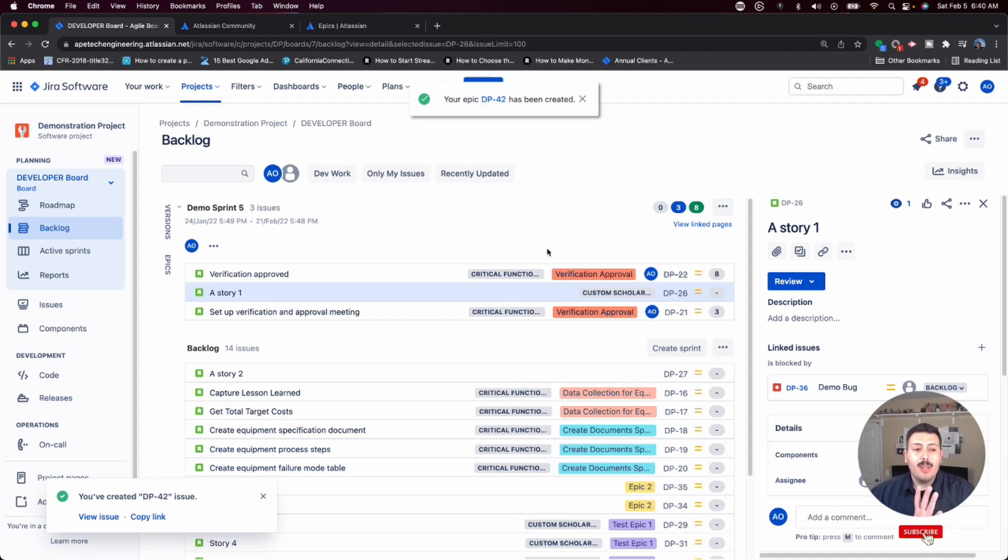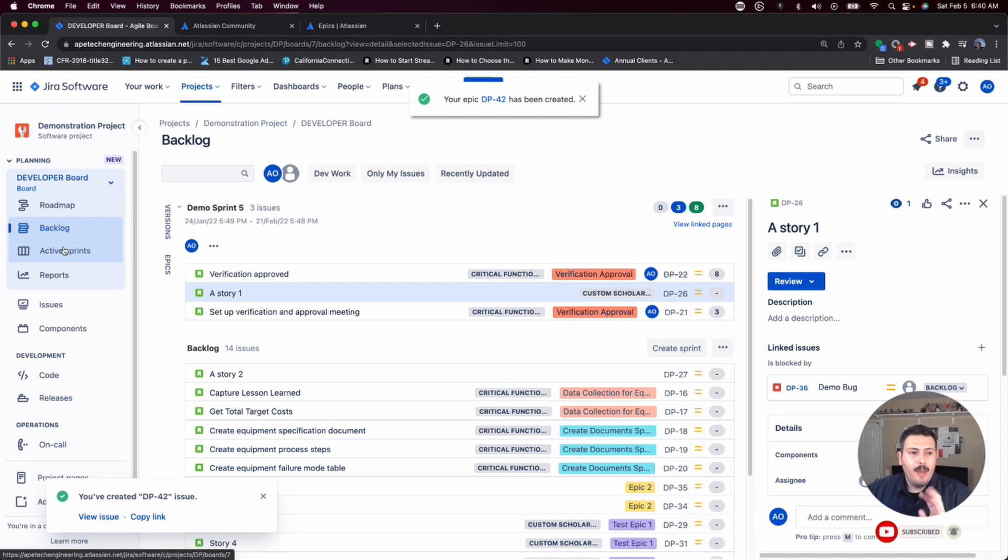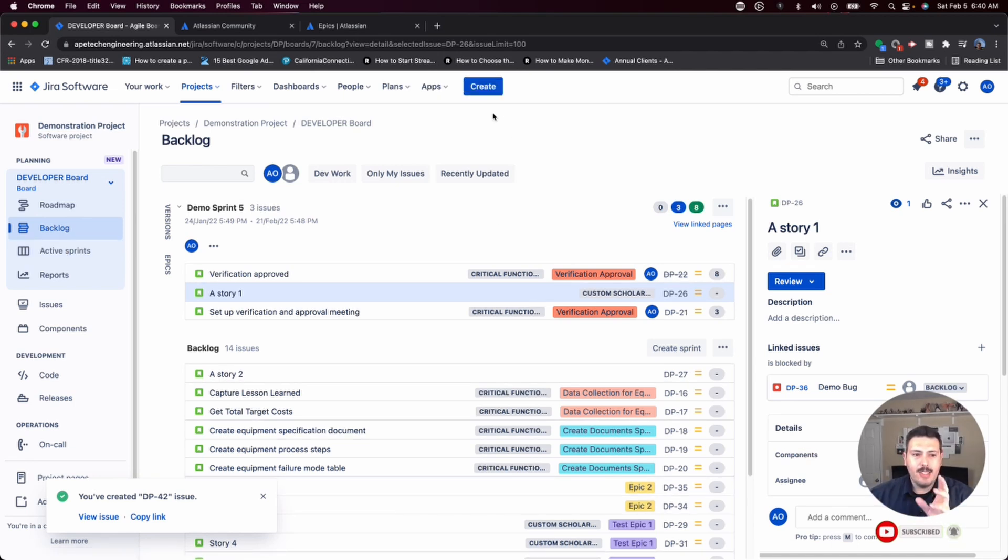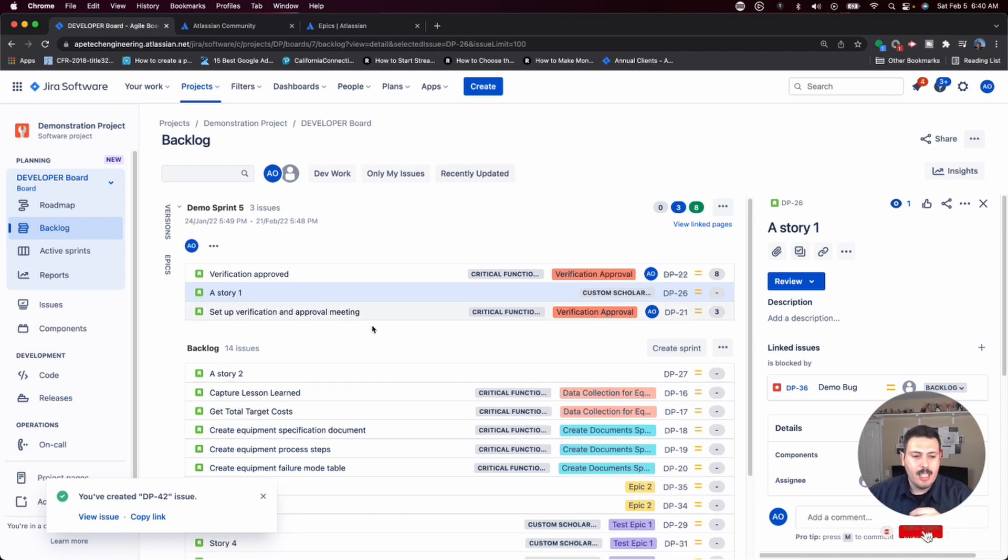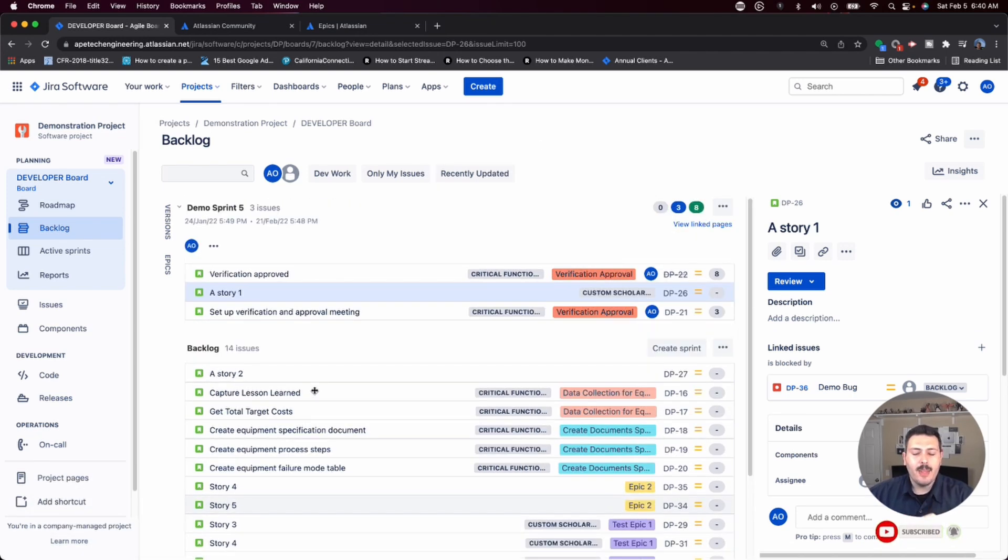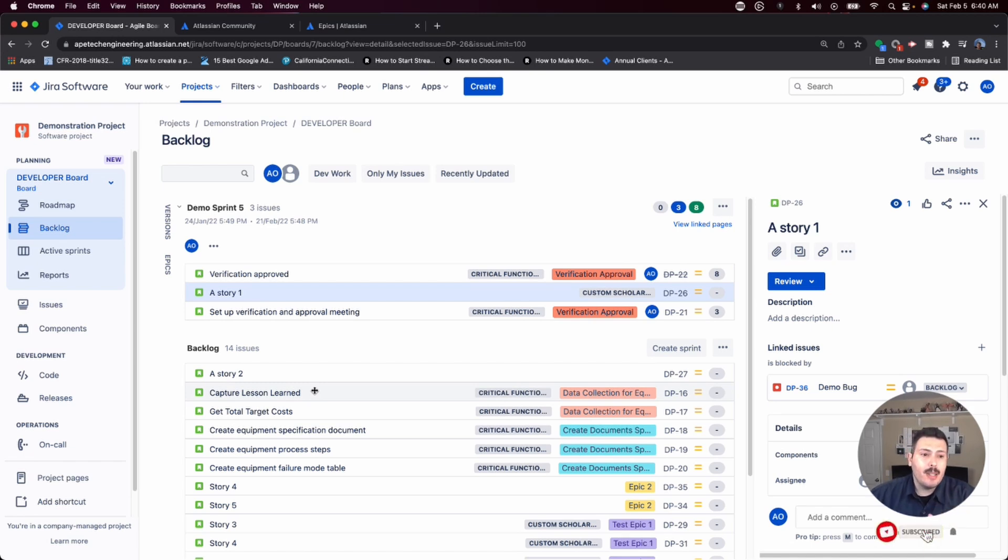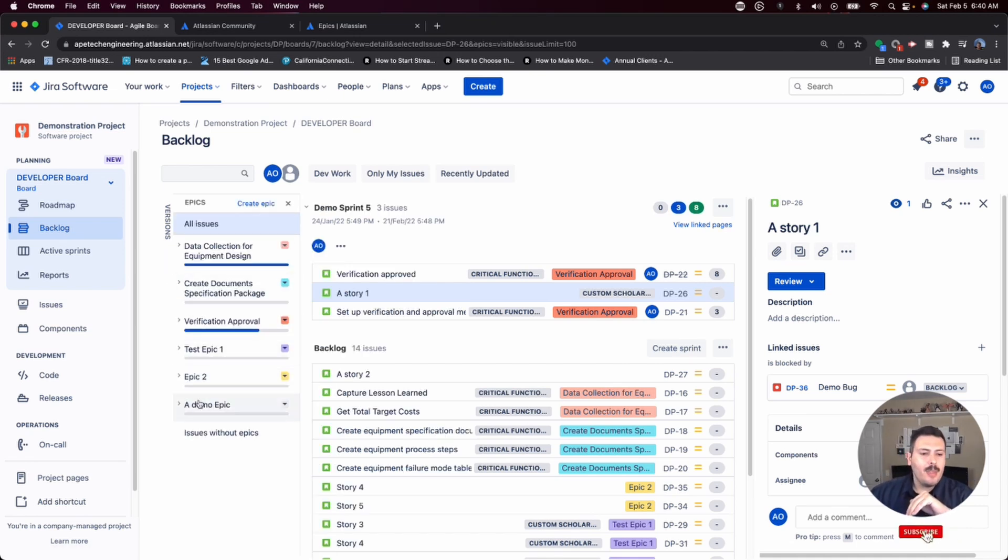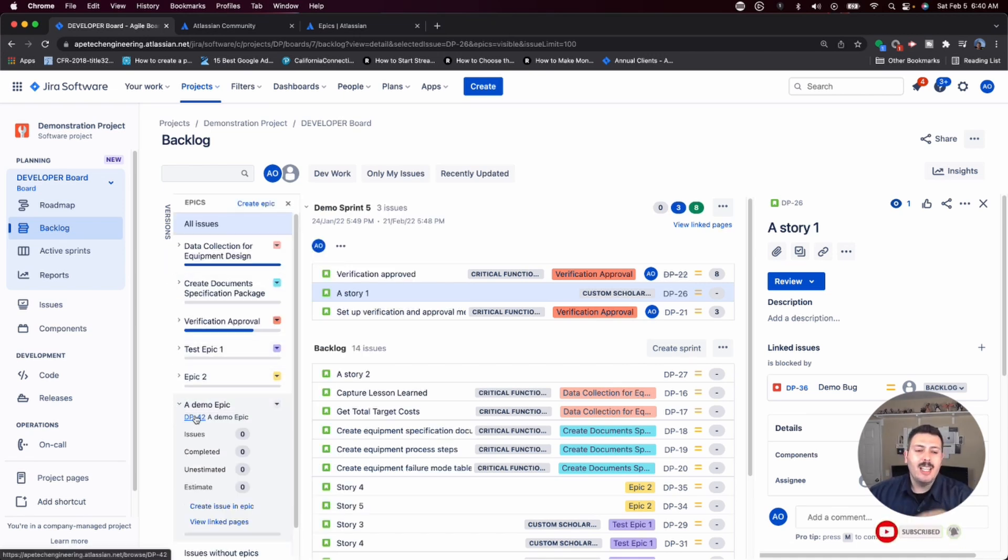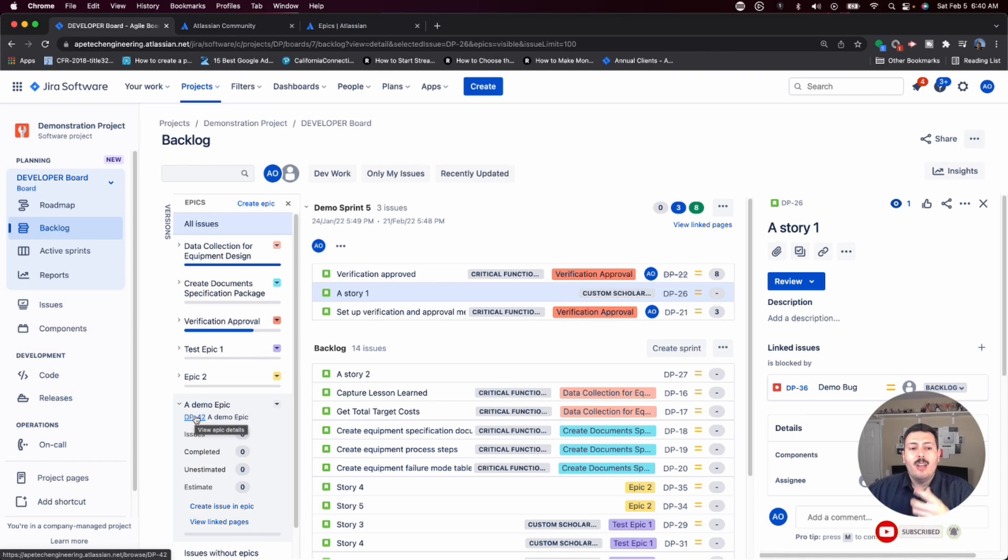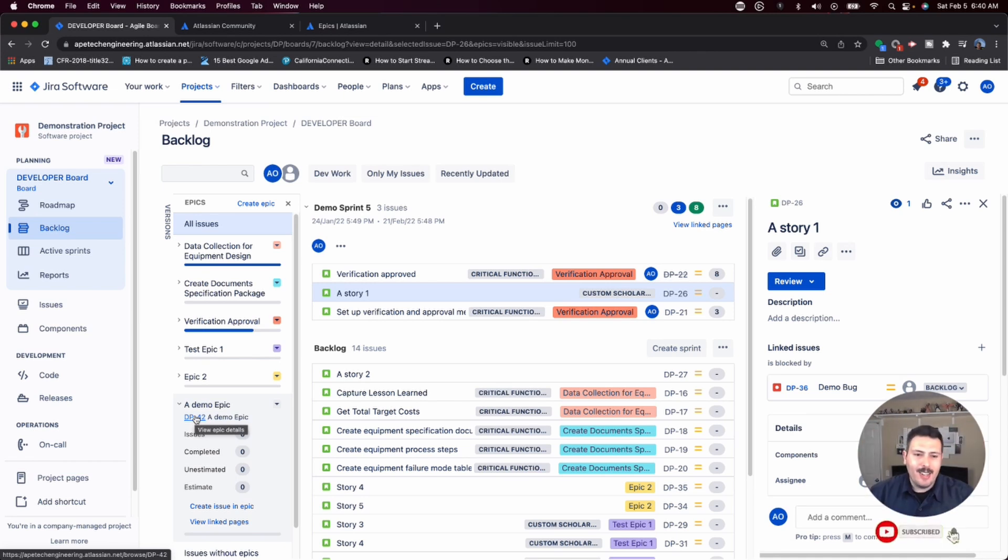Now, again, if you're completely new to Jira, you're probably going to be wondering and keep in mind, I am in a scrum type board, wondering to yourself, where the heck is my epic? It says that I created it epic DP-42. But if you actually look in your backlog, you're not going to find it. And that is because the backlog doesn't actually show you your epics, at least in a scrum board. And so your epics are actually, if you turn your head sideways, they're on the side here. And so you'll see that my demo epic number 42 is actually that epic pane. And so this is really key because this trips people out. Most people will ask the question of, I created an epic. Where did it go? Surprise, it's here. It went into the epic pane that's on the left.